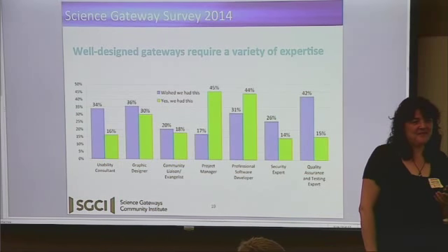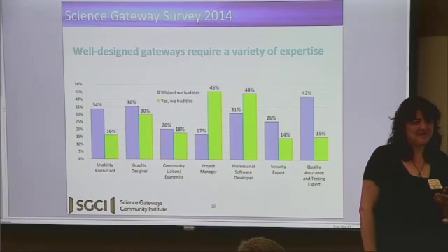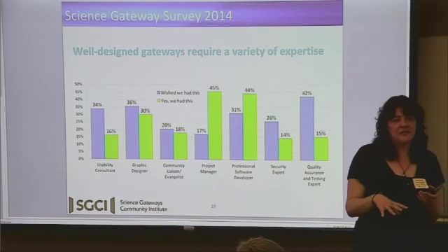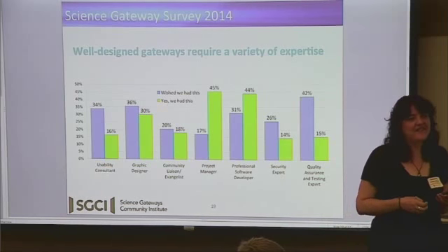Eventually, we have to deliver the science gateway and confirm that it meets the requirements of the researcher. And then at that point, it's handed off to the research team. And it's either all theirs or there's some sort of contractual agreement put in place with an operations team for so many hours per month or something like that. And that is then paid by the researchers? Yeah, typically in a grant.